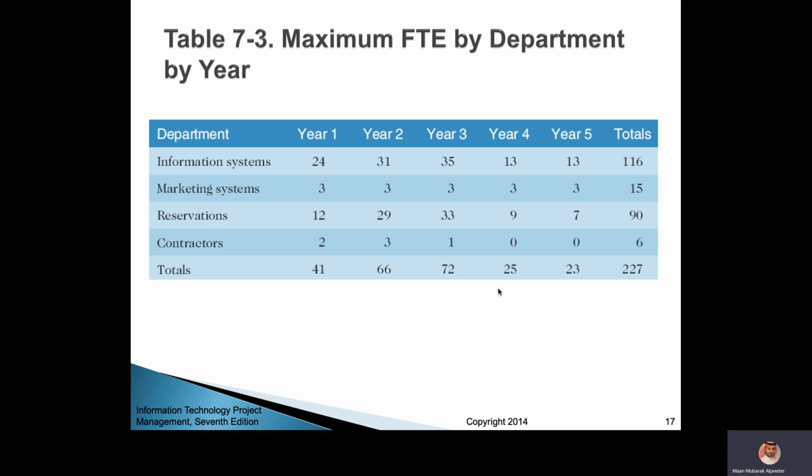Okay, so you have two developers, they work full-time. Then this means that they work 8 hours per day, and so for 1 week they will work for 40 hours. Okay, so 40 hours, and if you have 4 weeks in a month, this means 160 hours.